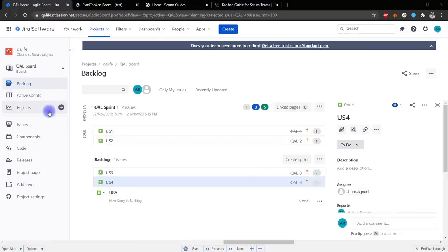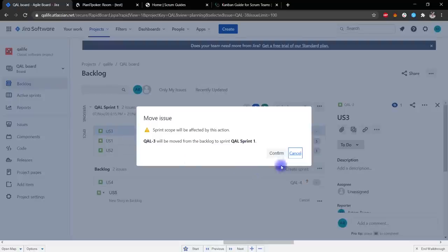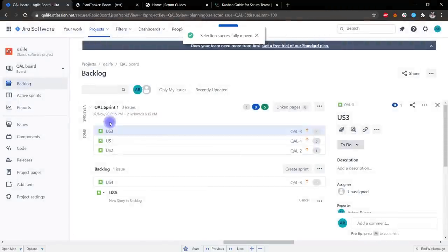So let's go straight to the backlog tab. Here we already have some project created and we have a backlog. I've created, hypothetically, several user stories. So this is basically our product backlog where we have several stories. I also created a sprint, and we can easily redirect, using drag and drop, our stories into our sprint. And now we have in our sprint backlog 3 user stories that we have to fulfill.